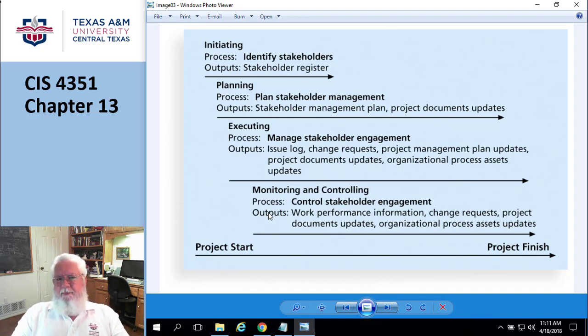Suppliers, it could be that the suppliers know more about what's going on in the industry than you do. I mean, for example, I tell the story from the contracting chapter about some vendor who's buying steel, and that's what he does for a living. And he comes to you and says, "Man, the price of steel is really going crazy here, and I need some price adjustments in my contract." Okay, well, he's buying and selling steel for a living, so yeah, he knows. He probably knows more than you do. So your suppliers could be a very, very useful and helpful source of information. So therefore, they are stakeholders. Okay, there's some other ones.